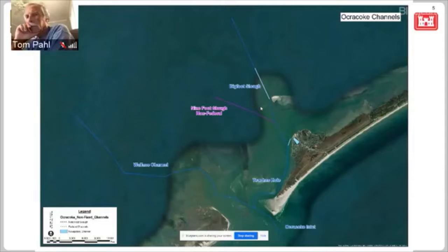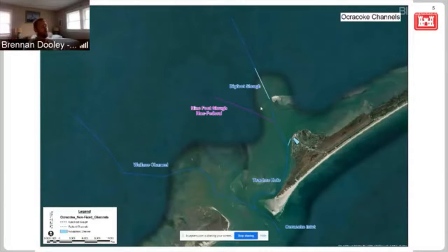So this is a similar figure, just shows our channels down on the other end of Ocracoke. I know that Bigfoot Slough, I think it's right in here, is where that shoal is coming in to the channel, and there's been some groundings, and the larger class ferries are having issues. And this year we've put the MERRITT, our sidecast MERRITT, in there twice. We had limited federal funds to help out, but we used the funds we had, and then we also reprogrammed funds from another project to try to help out at least, and we dredged a little bit outside of our channel and followed the good water to try to help out there.